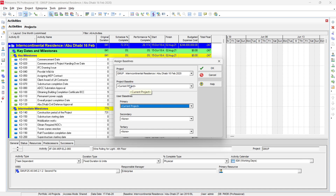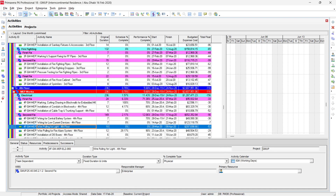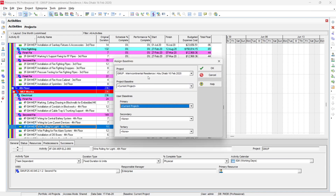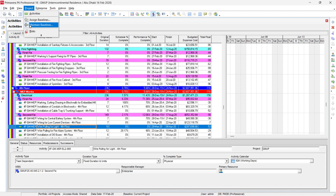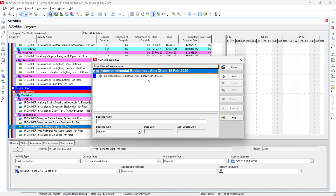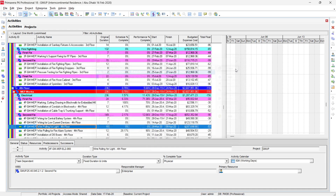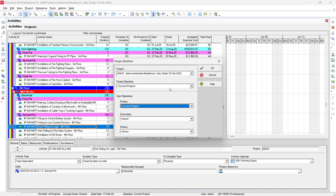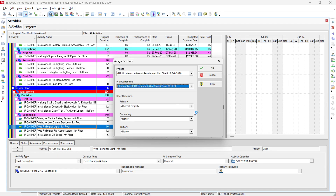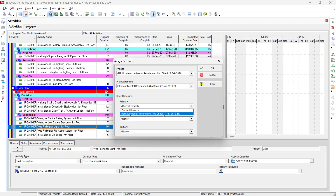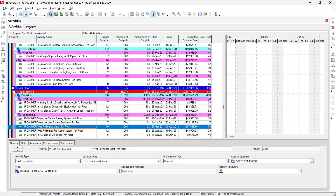I'll remove the baseline and set it to current project — notice at the bottom that the baseline now shows as current project. This bottom system tray shows you the immediate information you need. Now I go back to Project, then Assign Baseline. I've already created a baseline — if you go to Maintain Baseline you can see it — and I'll assign it as the project baseline.